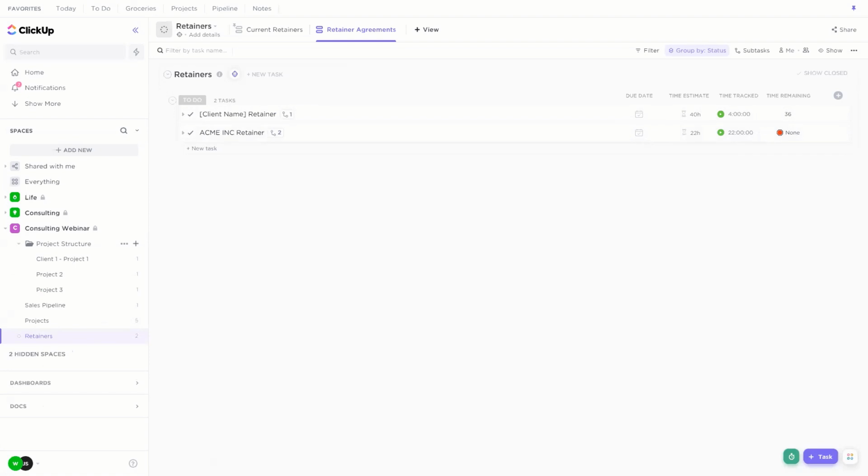Okay. Tim asked, when creating a template task for a project, is it possible to allocate a default due date, such as the start date plus 2 days for each subtask, so that once all the tasks are created, all milestones are auto-created? Yes. So let's do that real quick. It's called due date remapping. What it does is it looks for the very first date in that template and then maps it to whichever day you say, and then maintains gaps.